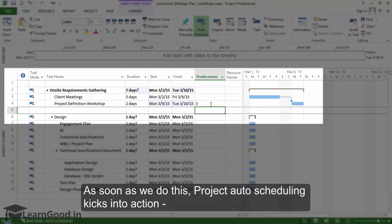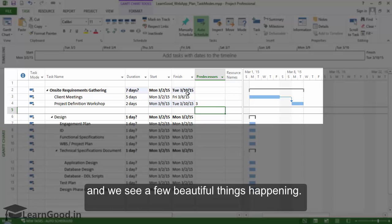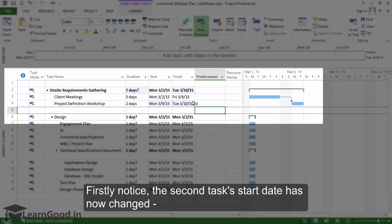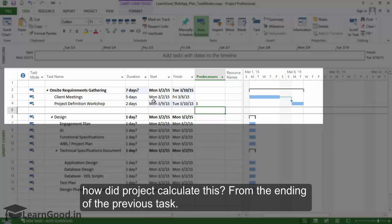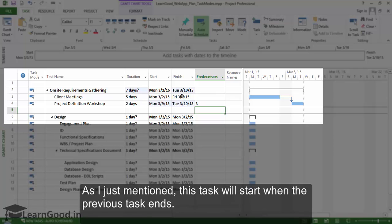As soon as we do this, Project auto scheduling kicks into action and we see a few beautiful things happening. Firstly notice the second task's start date has changed. How did Project calculate this? From the ending of the previous task. As I just mentioned this task will start when the previous task ends.